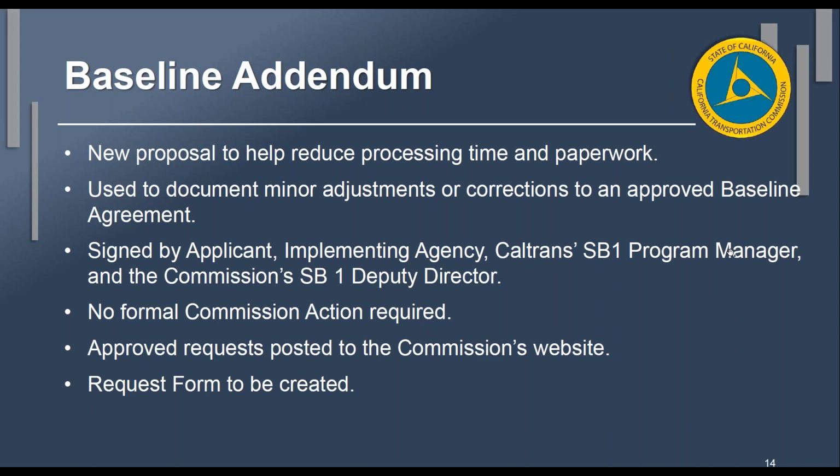If we allow a schedule change through either an amendment or an addendum, the next month there's another change, so we would do another addendum, and then three months later we could do another one, and then another one. At some point, I could see that becoming more of an issue, because now we're consistently changing the date that we're supposedly holding the project accountable to. So I do have some concerns with using this addendum process to change schedule dates.